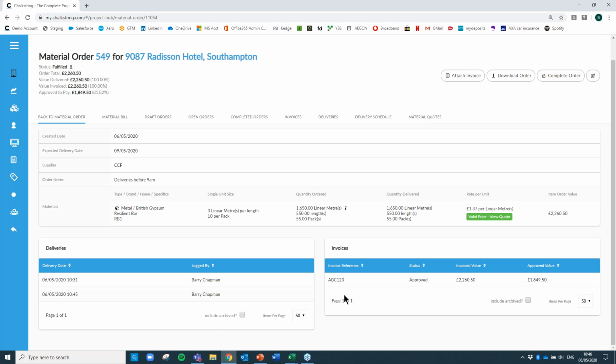And the last question, the fourth question I've got here, and we're running out of time, is our site managers don't do, inverted commas, don't do tech. How can we record deliveries? So that's down to this bit here, I guess. When you record deliveries, as you've seen, the site manager can go into the software. They'd have a locked down view of the software because their permissions presumably would be reduced to what you want them to see, which may just be deliveries or may not be. They can take a photograph of the POD and put it into the system.